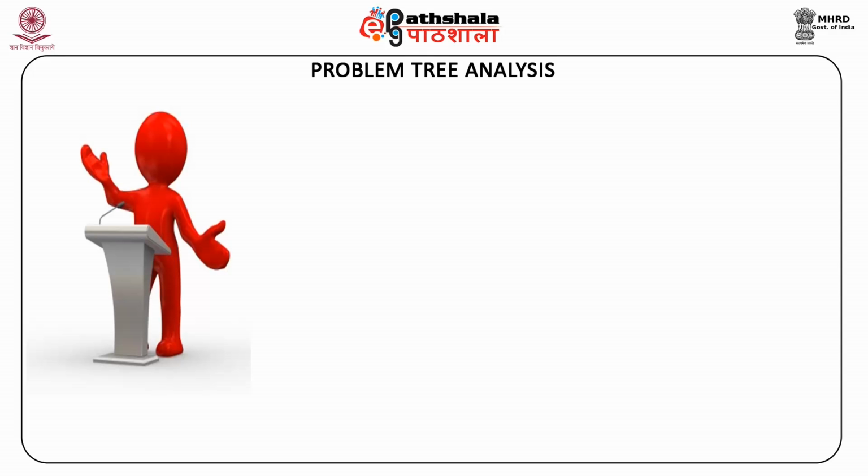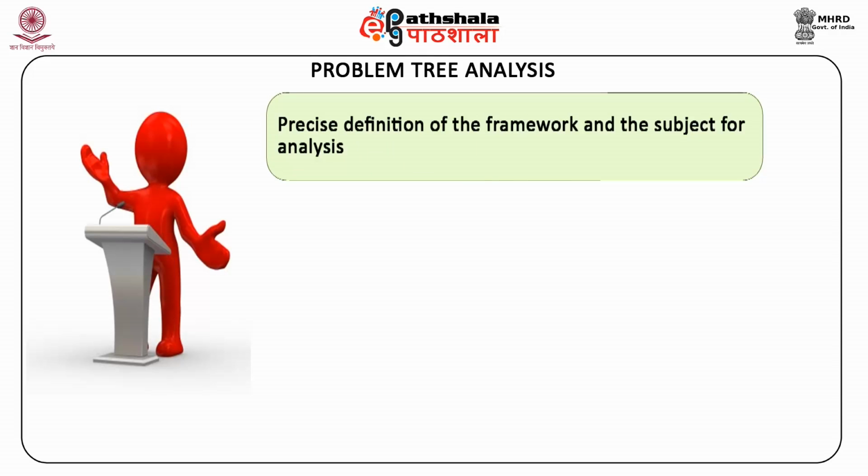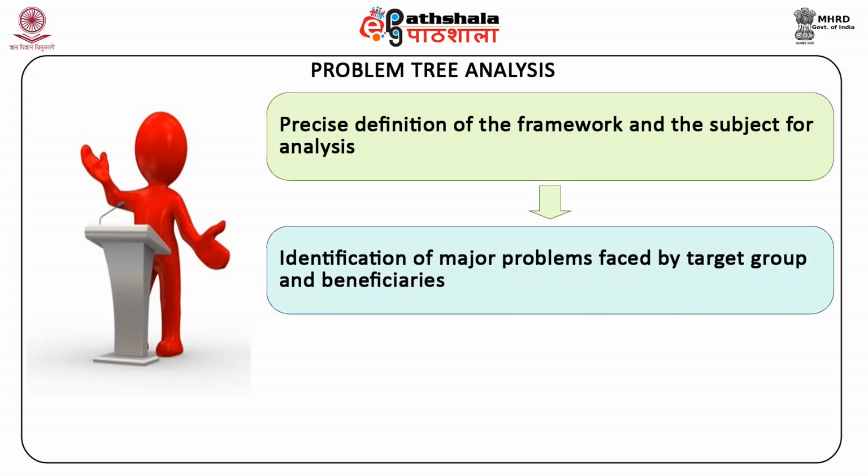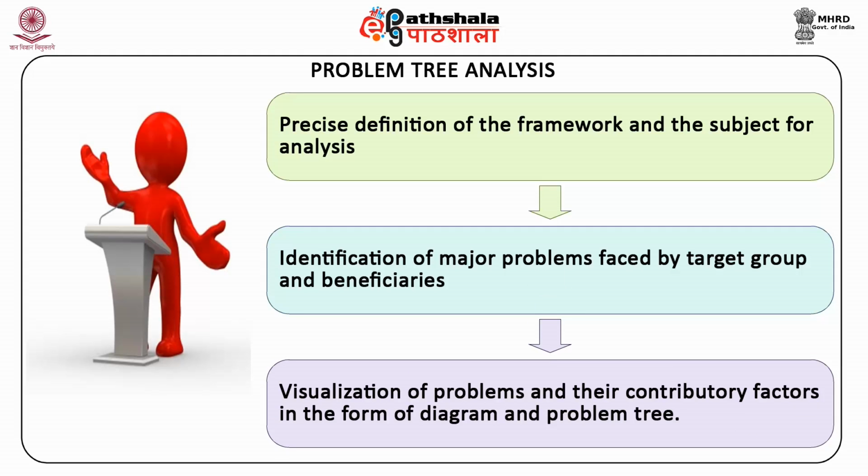It involves three main steps: precise definition of the framework and the subject for analysis, identification of problems faced by the target group and beneficiaries, and visualization of problems and their contributory factors in the form of a diagram, the problem tree.